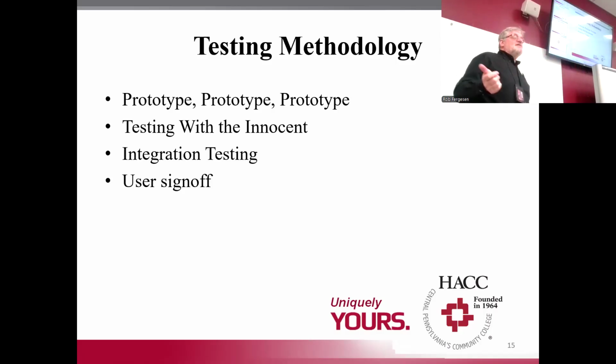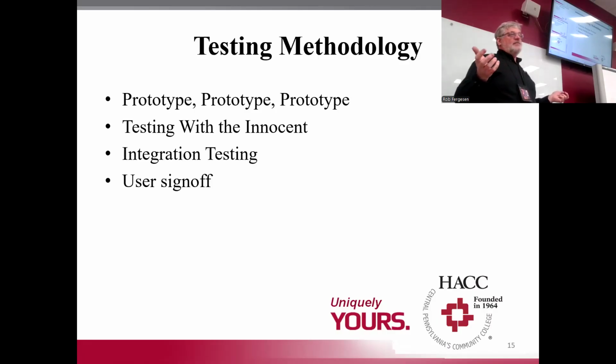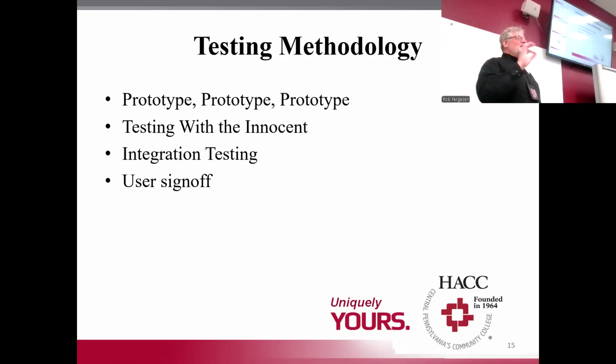And last but not least, I'm going to say user sign-off. In your testing, anytime you make a change to an HMI, get your users to sign off. Once they finish their testing, you sign it off, you walk away. There's a couple reasons for this. One of them is simple CYA, right? If you have gotten user sign-off and then the user blows something up, the user can't say, I didn't agree on that. At least he agreed on it, right? So it's a little bit of CYA.